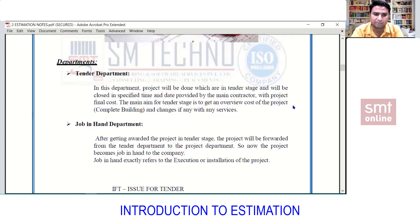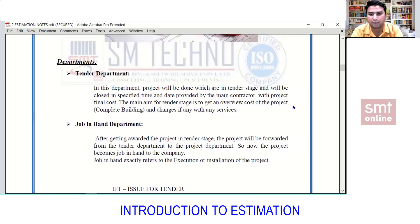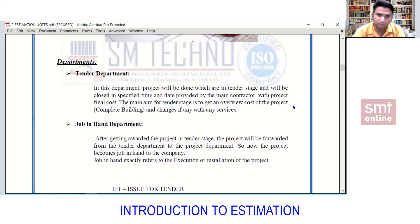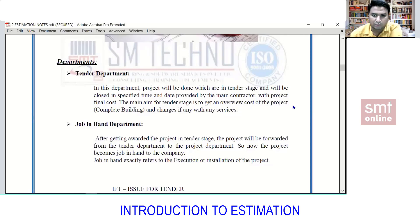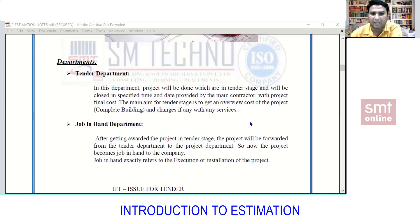The engineer who works in the tendering department works only on freshly released projects. These projects are in the tender stage, must be closed within a specific time, and the final cost is provided to the main contractor. The main aim of the tender stage is to get an overview cost of the complete project and building.